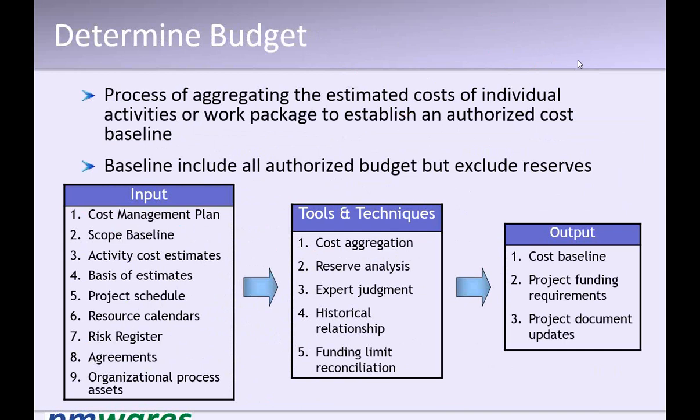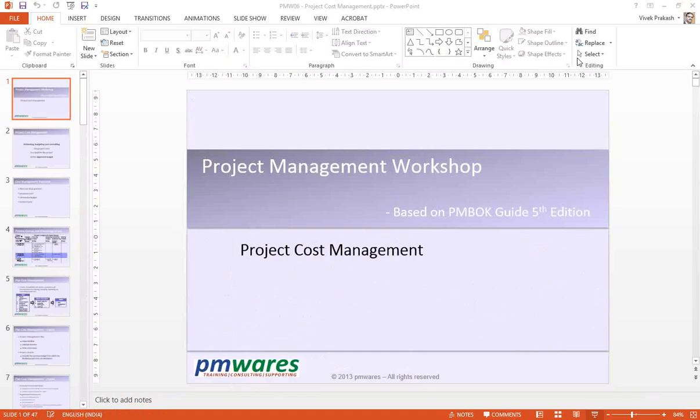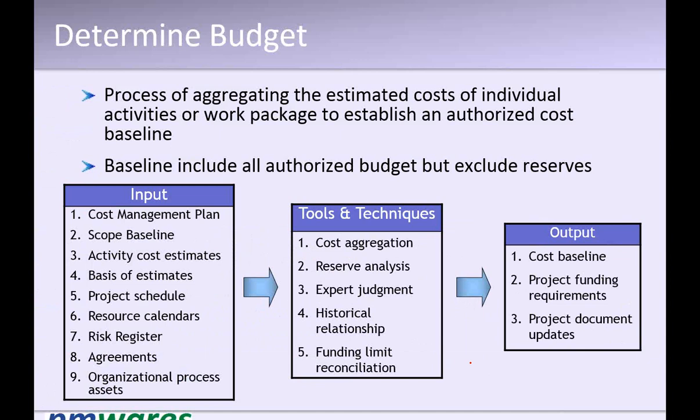Budgeting is planning for doing the expenses. That is your budget: planning to spend the estimated cost. So a budget without a plan of expenses is an allocation.